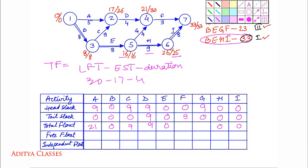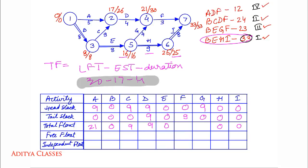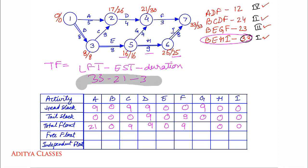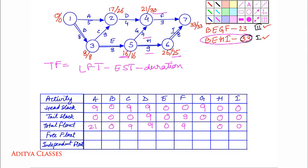Then we have F: 33 minus 21 minus 3, giving another 9. Last one is G: 30 minus 16 minus 4, giving me 10 this time. For a change we have a 10. For the first time we are getting a 10 amongst all these 9s.